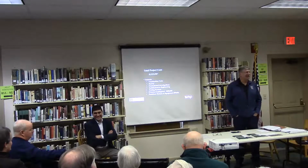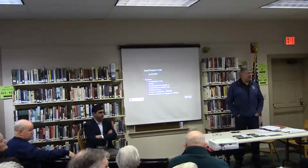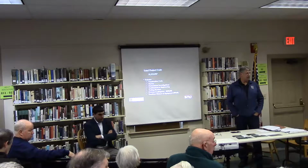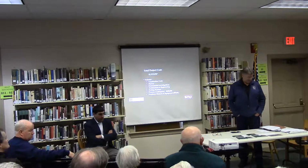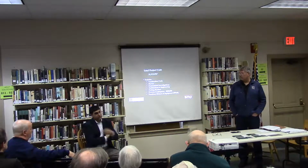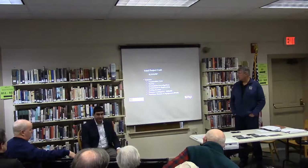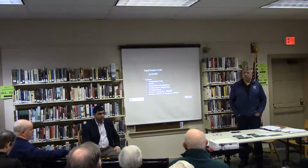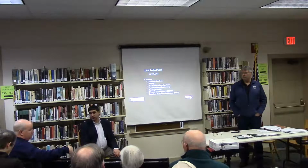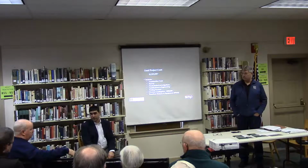It's pretty easy. If you take your total of 1,919,000 and you divide it by the total square footage of the old construction and the new construction, you'll get your square foot construction cost. And that takes into consideration all the fees, the contingency, the furniture, your testing services, your surveys, and everything else. The list is right in front of you. Yeah. Well, it's a different number, a different spin. You're including the old space with the new. Right. And I guess as long as you're ready to answer the question about, really, it's only 210?